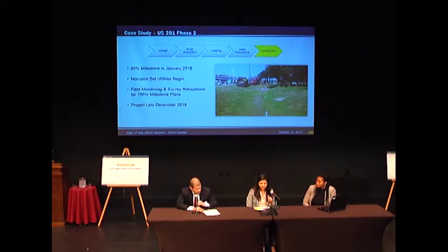Yeah, so I wanted to add one thing that actually just came up yesterday or a few days ago. For your joint bid projects for the Buy America, please confirm with your construction office that they are receiving the proper documentation for Buy America. Don't assume that construction is handling it. We have confirmed that there's some confusion whether the utility company inspector is getting that Buy America documentation or if it's a TxDOT inspector. So just a word of advice, when you go back to your district, please maybe set up a meeting with your construction office to make sure that y'all are receiving the proper Buy America documentations.